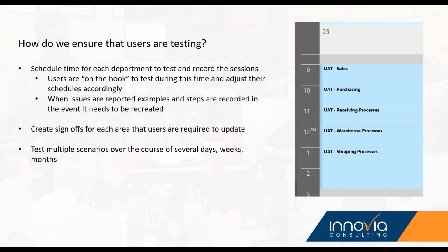If you set up Teams meetings, GoToMeetings, whatever way that you as a business record, these are perfect opportunities. One opportunity is we then know that they tested. We can prove it. There's no them saying, I did that, but I don't know what database I was in, so I don't know why you don't see what I'm seeing. We now have proof. It sounds terrible to say, but proof that the user tested. We then have recordings that if issues arise, we know what steps were being taken.